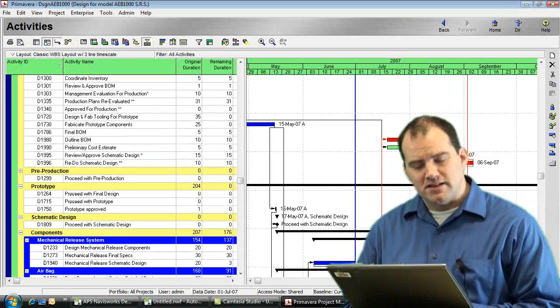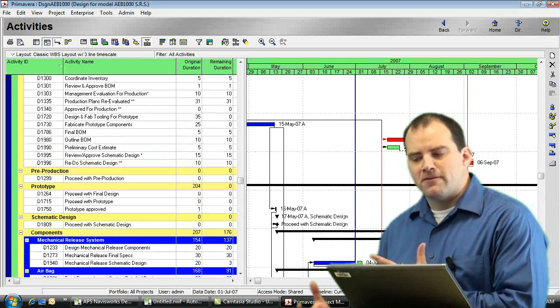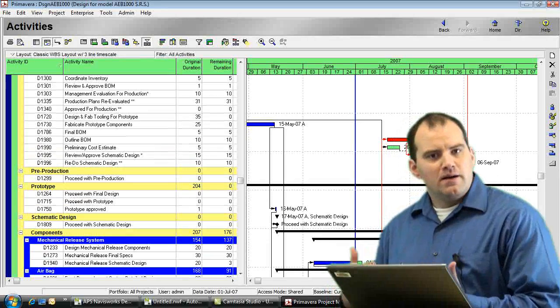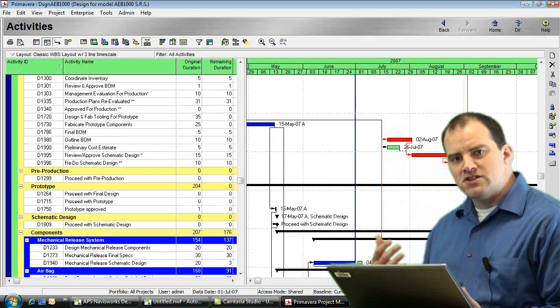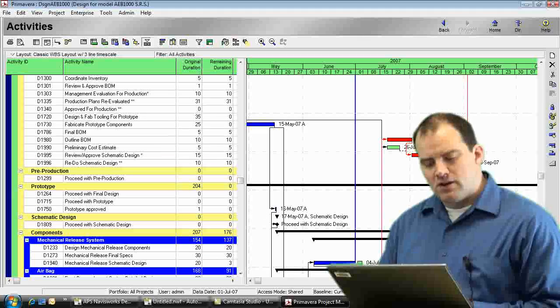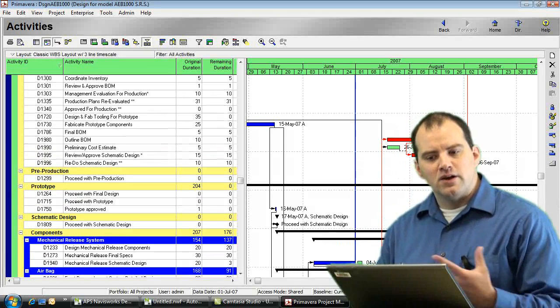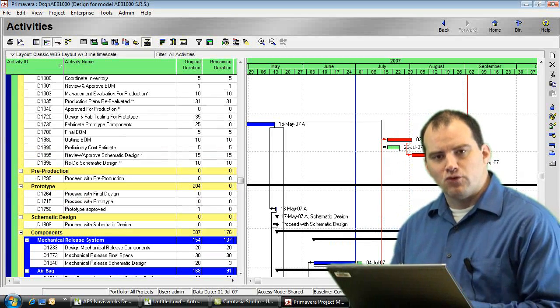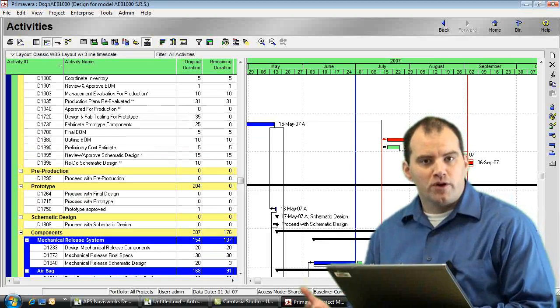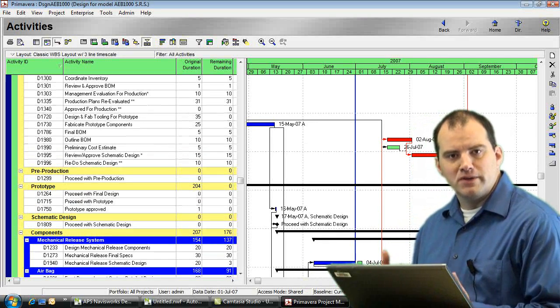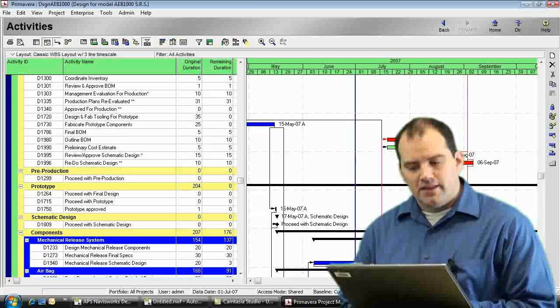For one thing, we might see that we're focusing a lot of our effort on one small area of the site. We might be running into productivity issues because we have too many people focused on one small portion of that. We can now look at ways that we can branch out so that we have a little more flexibility, but more importantly, that also becomes a way to help mitigate some of the safety challenges that construction brings.